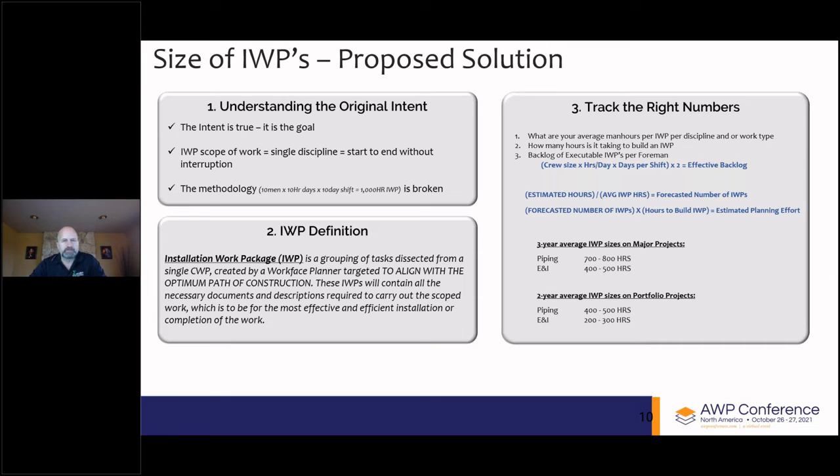IWPs are dissected from a single CWP. IWPs are executable discipline-specific work packages of work. IWPs are to be created by planning teams and used by our foremen for our construction workers to execute the work. IWPs will contain all the information needed to execute the work of scope.